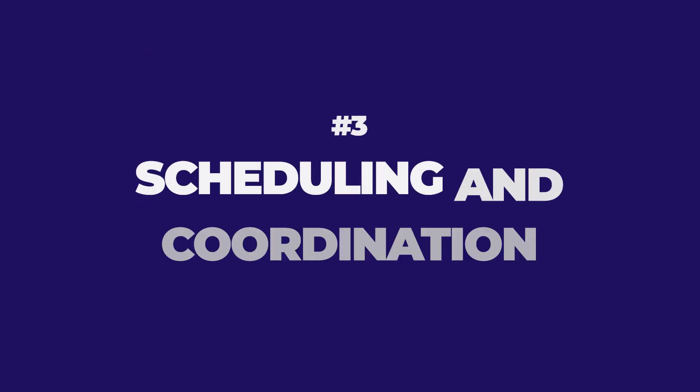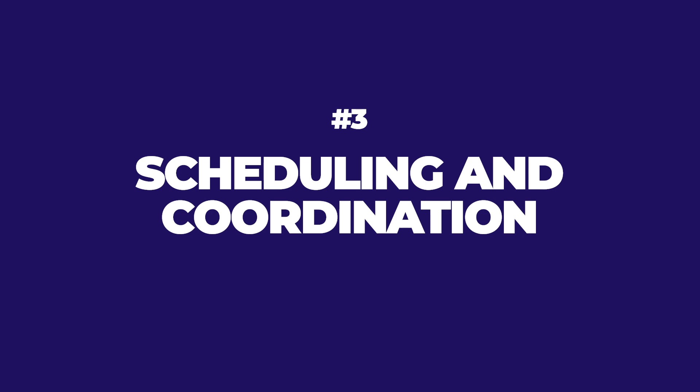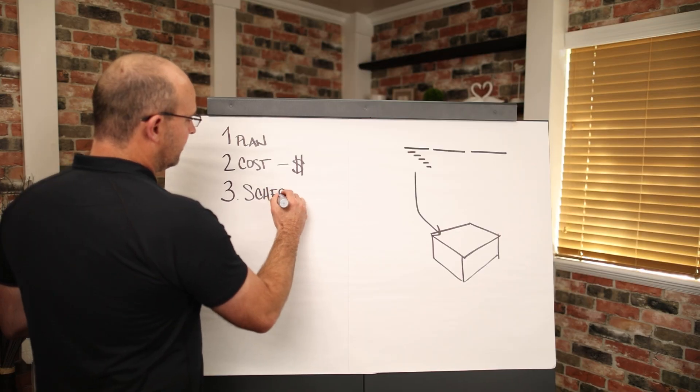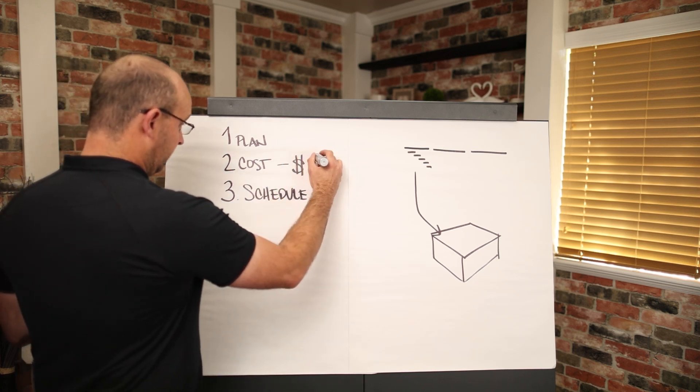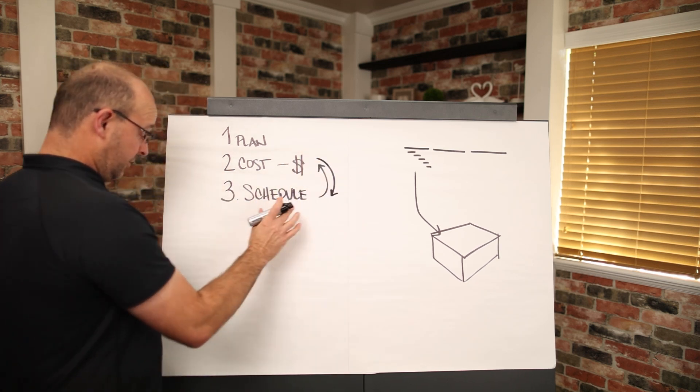Step number three is scheduling and coordination, okay? So if you have your plan and you have your budget, and these tie together by the way, you can only have the right budget if you know the schedule, right? And you can only have the right schedule if you know the budget.